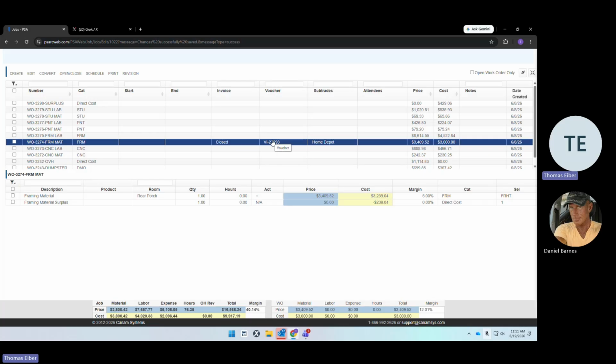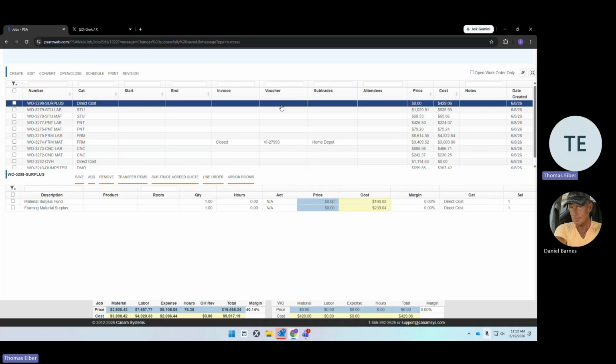However, you're not earning that money back into the job because of Jeffrey's purchasing power. His ability to get us great deals adds to the margin positively only. You can't assume that because he uploads a receipt for $2,700 that you can come back in here and edit this down for an additional $300 to pay that back into your surplus. That's not how it works. You allocated $3,000, you spent $3,000, Jeffrey used purchasing power to increase the margin, but you don't earn that back. You've already given yourself your surplus. That's what this is for.